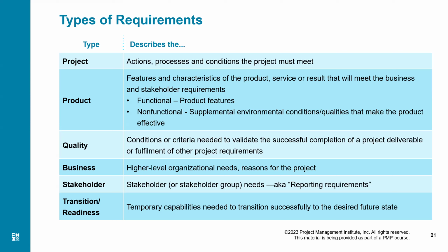But the functional requirement was the box should be yellow color. That's it. That was a function, right? But the non-functional requirement is that tolerance. Now it may not relate to quality as well. Sometimes there could be other supplemental requirements like security, like safety, like environment. All those things, which are specifically tied to the product, will be called non-functional product requirements.